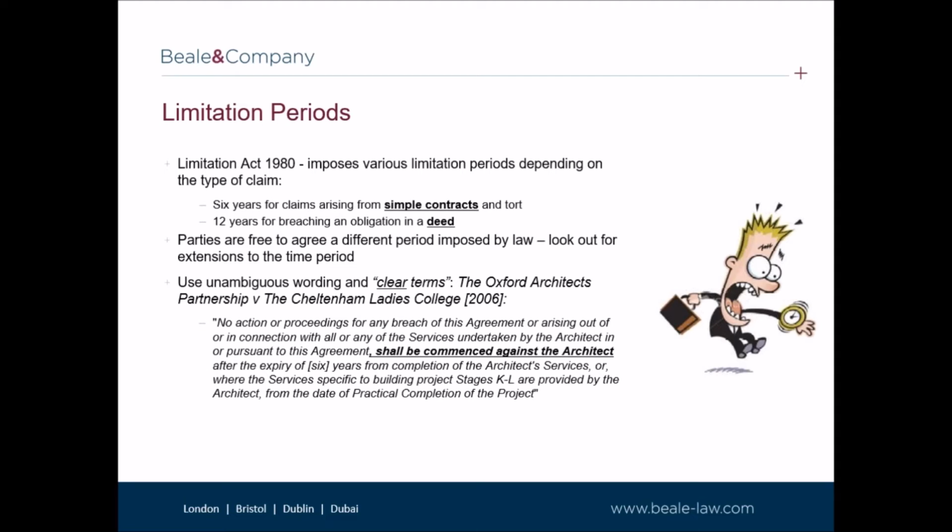In our view, this should be avoided. We recommend that the drafting is added to say that the time period in which claims can be made ceases upon the earlier of completion of the services, PC, termination of the appointment, or importantly, as prescribed by law. This area of the law was the subject of the Oxford Architects case in 2006.